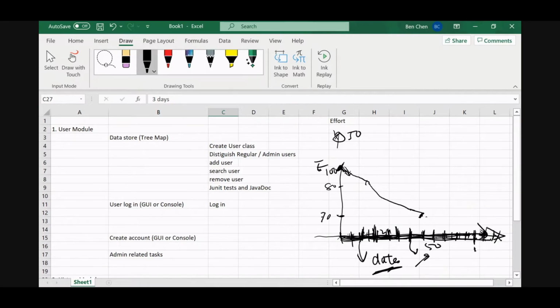So dates are secondary, but hours is concrete. That's how many hours you need, how many hours you put in, and that gives you a solid chart. Because the days are not solid. A day could be any number of hours from 0 to 24, but hours is concrete. That's how many hours you spend on this project on that day. So the word I was looking for is secondary. Date is secondary, hours is primary when you build this chart.